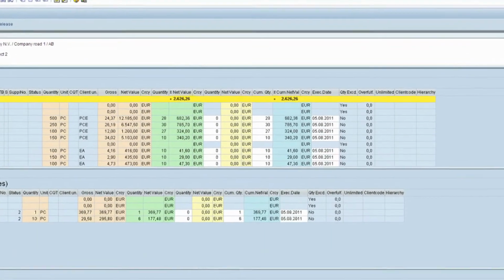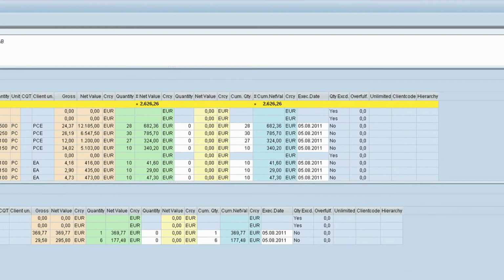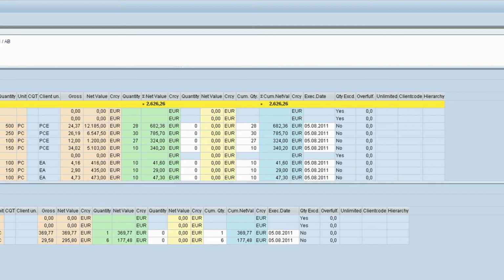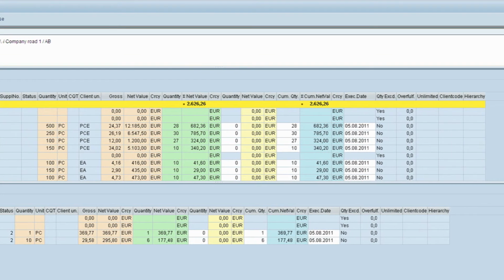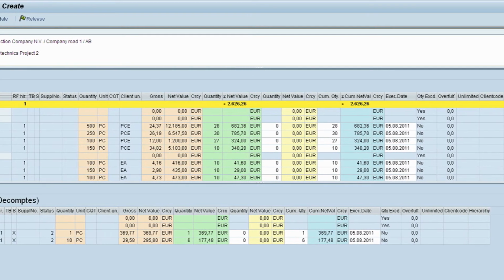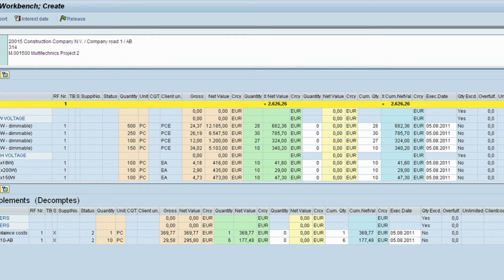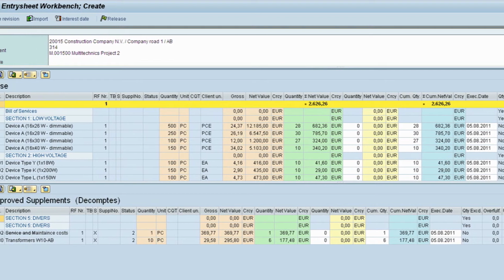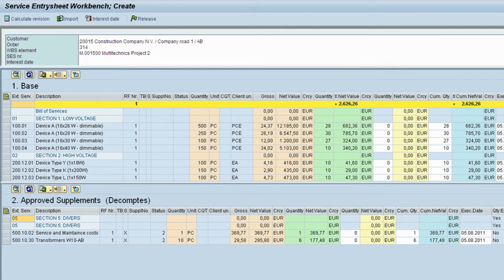In addition, specific details can be indicated per item, such as the used revision formula, long text, unity of the customer, or contractual amounts that can be overwritten. In the column amount, quantity, or cumulative amount, cumulative quantity, the amounts to be invoiced will be shown, which should be invoiced for a certain period, input quantities.